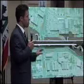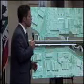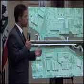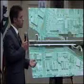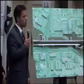What we're talking about is primarily what you just mentioned: AT&T has a shared duct bank that runs along there. The good news is part of that has reached its useful life, and they're abandoning part of their line, which is great news for people like me. The second half of it is, what do we do when we run a shoe fly on PVC or HDPE or some kind of plastic that's effectively brittle? Well, the answer is we're not going to run on it. We're going to make the utility companies relocate in advance of us. So on your schedule where you see utility relocations, that's what that refers to.